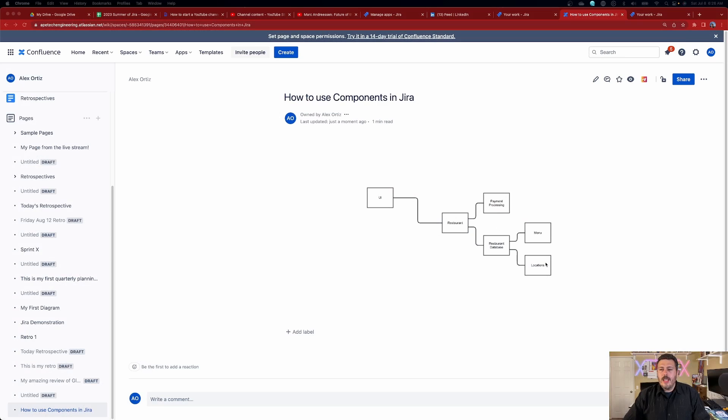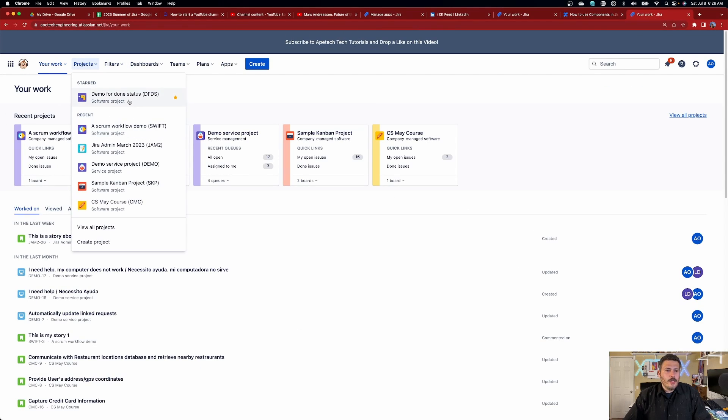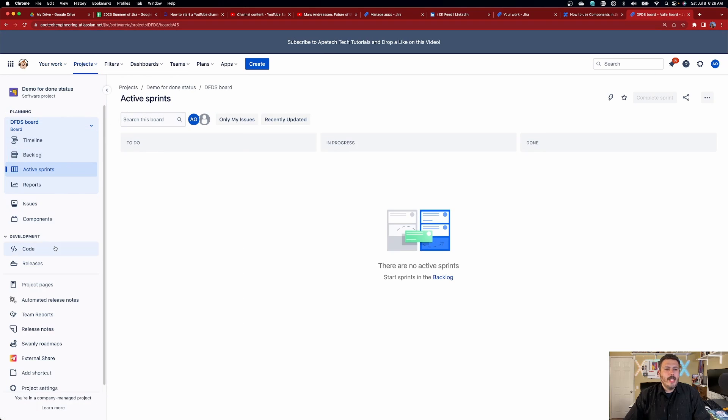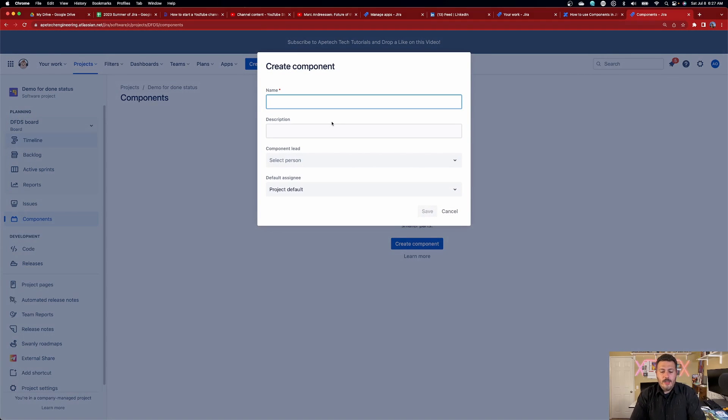That's how I like to explain it. Take your architecture diagram, whatever existing block diagrams you have, look at it and find all your boxes — don't worry so much about the wires, but each one of those boxes becomes a component. When you come over to Jira and go into your projects — I'm going into this demo project here — you'll have your components section on the left. Click into it, click create component, and you start typing away, starting with your UI, then adding the next one like restaurant.